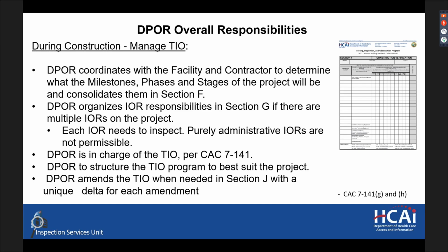The DPOR will be organizing IOR responsibilities in section G of the TIO if there are multiple IORs on a project, or if they can't fit it in section G, they can present an IOR matrix to the field staff for review. And everyone should know that every IOR listed on a project needs to inspect. A purely administrative IOR is not permissible.